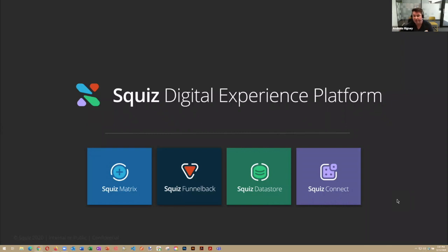But what we would do is break out our features. We would then round table estimates, looking at requirements. We would have our product owners in there. We would have our technical SMEs, and we would get the highest cut, and we could then schedule that with our student services and comms guys to see where those features would need to be delivered to be temporarily usable by students. Once again, not delivering something that should have been delivered 3 weeks ago because we've missed the boat. So shuffling those pieces around, which we actually did on a massive big whiteboard to work out where we could take the things.